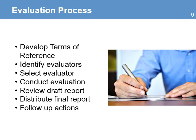Here are some of the basic steps in the evaluation process. The first is to develop the terms of reference — a document that contains all the information to guide the evaluation. Next is identifying evaluators based on their knowledge and area of expertise, then evaluating proposals and selecting an evaluator. Conducting the evaluation includes data collection and analysis. The review of the draft report gives the project manager an opportunity to ask for clarifications before the final report is submitted. Once the final report is submitted, it is distributed to key stakeholders. Finally, the follow-up actions include implementation of the recommendations in the project or in the organization. As a project manager, you will need to be fully involved in the development of the terms of reference, the selection and supervision of the evaluator, including the review of the final draft report.